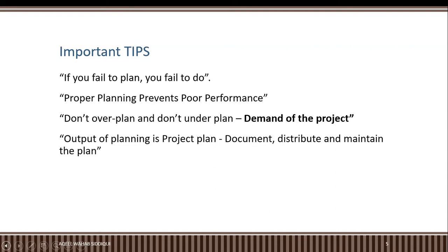Then we talk about gathering requirements from the stakeholders based on the stakeholder register. So we identify our requirements in detail. Based on the requirement documentation, the next step is to develop the requirement traceability matrix document, where we correlate our project objectives, which are given in the project charter, with the project requirements.